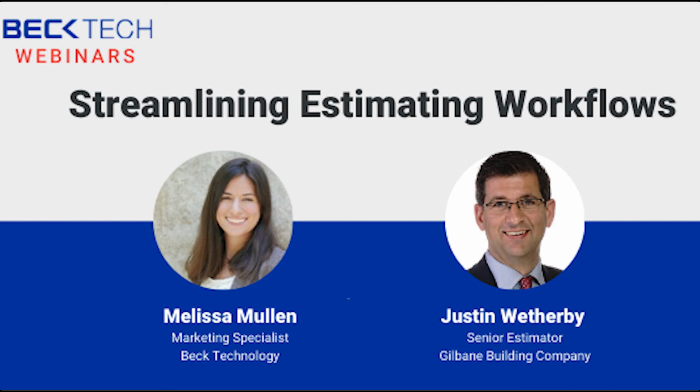And then two is historical cost. Before, we would either use a database to load Timberline estimates into a historical cost database, or pull them together in Excel spreadsheets of the latest estimates. We don't do that anymore. Now with team estimating, we have the ability to get real-time historical cost on estimate data. That's huge. And we can break that estimate data out by CSI MasterFormat, unit format, or anything. We have that information right at our fingertips. It's extremely powerful stuff.